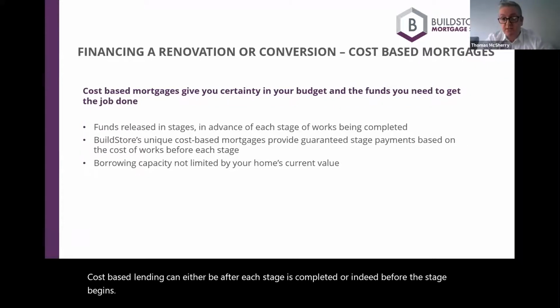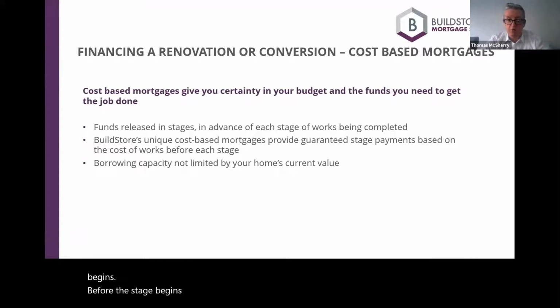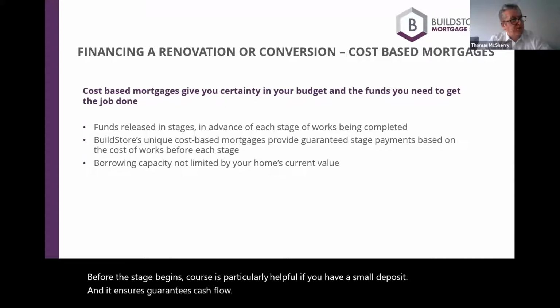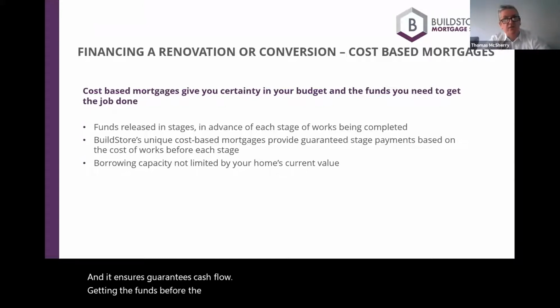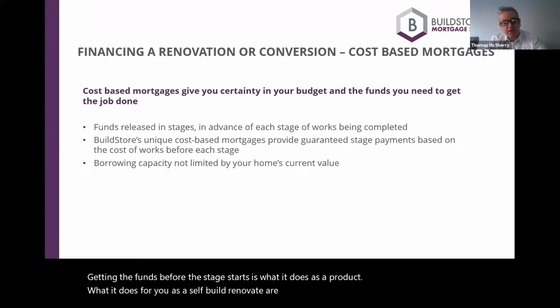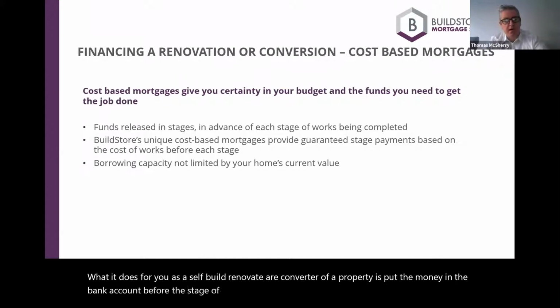Before the stage begins, of course, it's particularly helpful if you have a small deposit and it guarantees cash flow. Getting the funds before the stage starts is what it does as a product. What it does for you as a self-build renovator, converter of a property, is puts the money in the bank account before the stage of the work's about to be carried out.